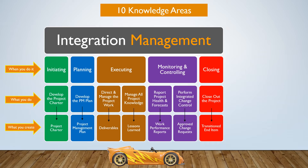During the initiating or the kicking off of the project, a project manager needs to develop a project charter. It creates a document called the project charter — our high-level document that guides the project. Once I've got a charter, I can plan the project, and that requires developing a comprehensive project management plan that covers everything we need to know and do. That produces the project management plan.